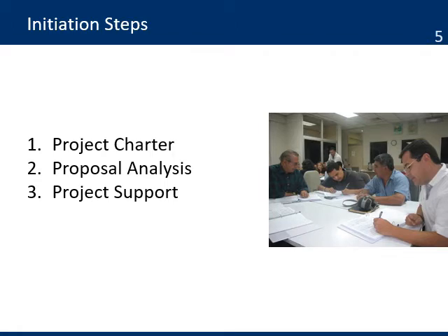The project charter. This document describes the project objective, but most important, it defines the authority of the project manager. It also sets up the project governance that describes the people and process of decision making in the project. The governance can include information on the project committee that will oversee and support the project.